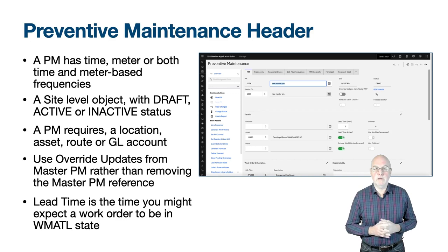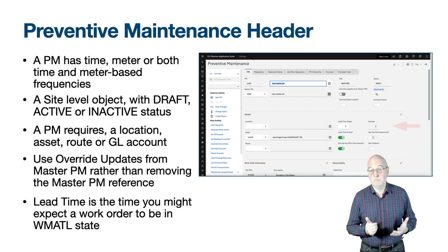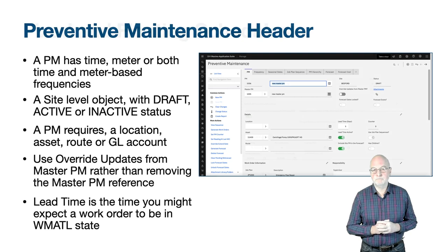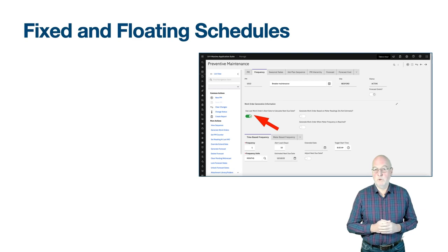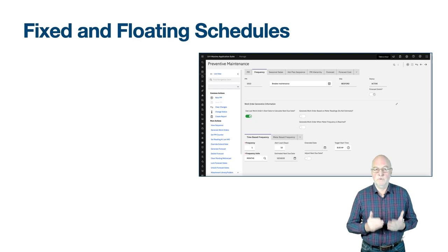The counter field is important and we will explain this shortly. On the frequency tab there are two tabs towards the bottom of the screen for time-based frequency and meter-based frequency. The field 'use last work order start date to calculate next due date' — when set — creates fixed schedules. If unset, it creates floating schedules.